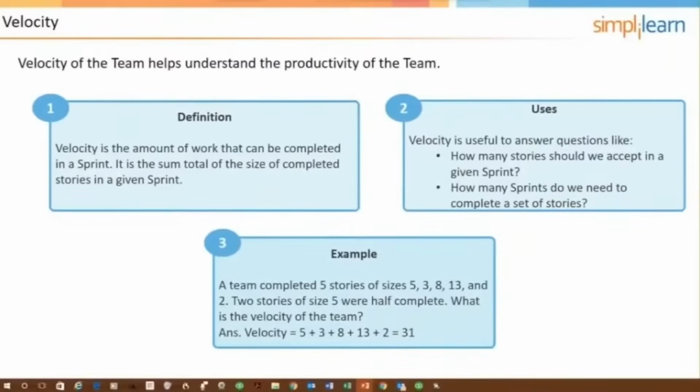And it is an observation. It's not a prediction. So if we're working on sprint 5 and determining what our velocity is, it would be the average of the previous 4 sprints. If there were any outliers, you would disregard those.